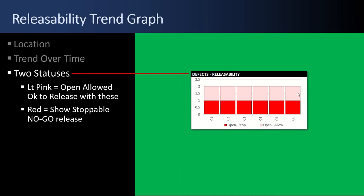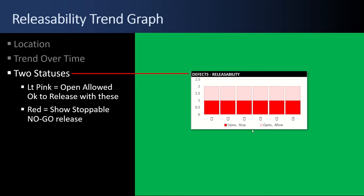There's two statuses. There's light pink, which are open allowable defects that you can pass on through because they're low severity. And then anything that's not pass through allowable is a showstopper. You wouldn't release with it. I just want to focus on two states. Can you release with it? Open allowable. Can you not release with it? Open stopper. This graph is very useful in situations where you're being pressured to release but are not quite yet ready. You can show the trend over time.